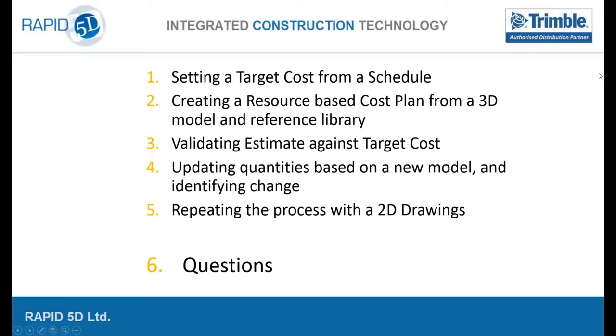Alternatively, we can build them up from scratch. So every time you do a new project, at the end of the project, you integrate that costing data back into your standard costing library, and then you can reuse it on future projects. So really, over time, you're just building that momentum and speed with your estimating.